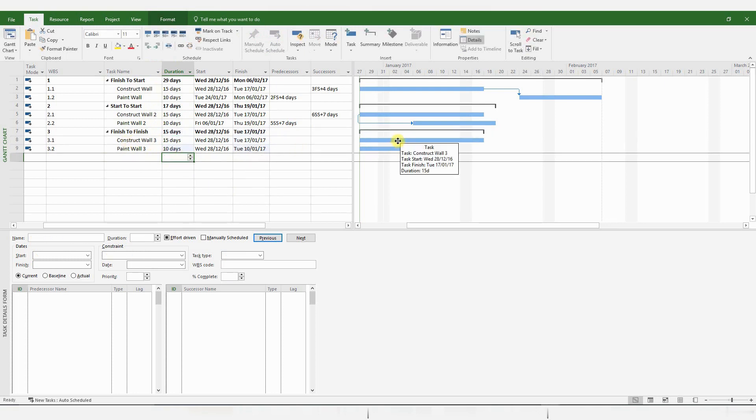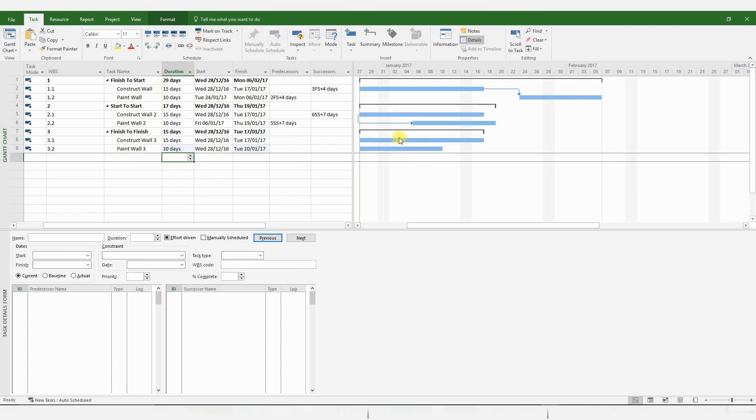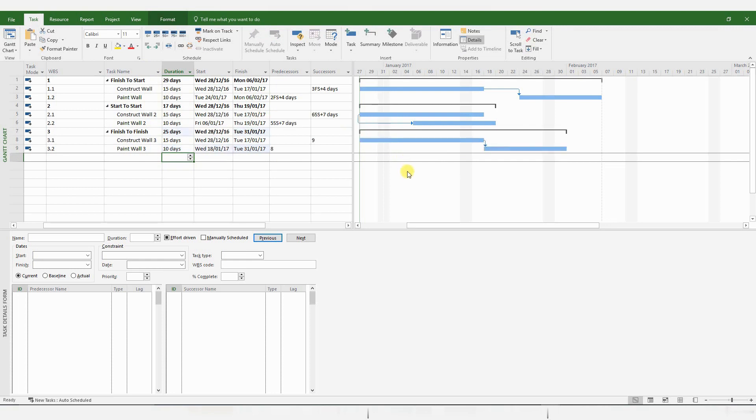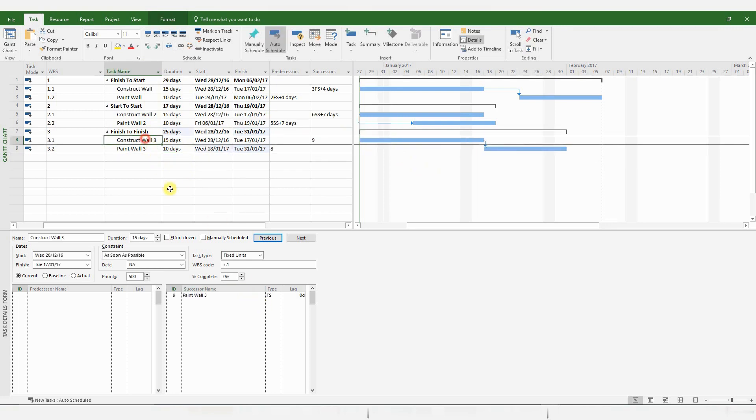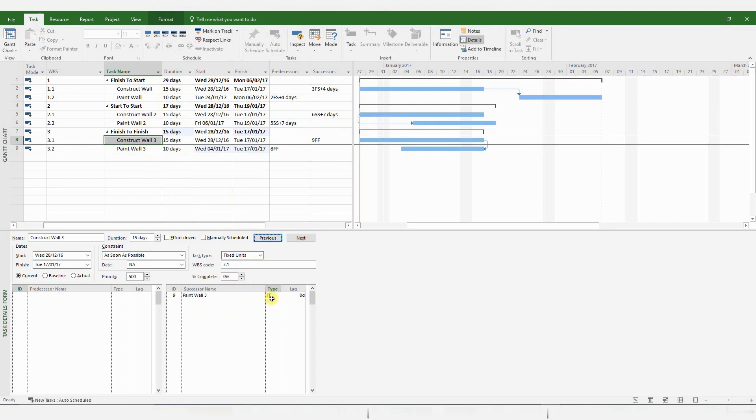Okay, so just to show you what happens when you click and drag. As I mentioned before, you get a default Finish to Start relationship. So we're actually interested in a Finish to Finish relationship. So let's choose that option from the Type menu. And there you have it. You have a Finish to Finish relationship.